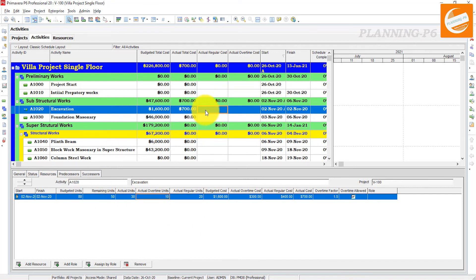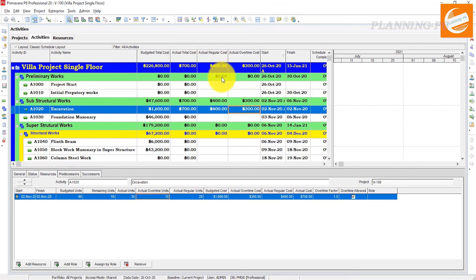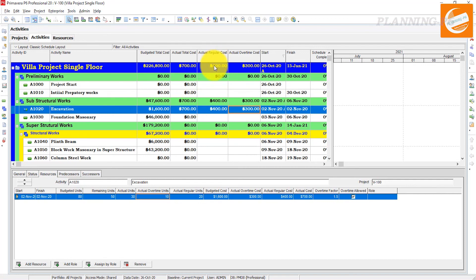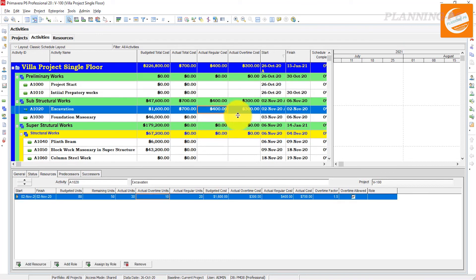Go to the activity and click on it — you can put the values in manually. The Actual Regular Cost shown in the resource details is 400, so put 400 in the Regular Cost column, and the Overtime Cost is 300 — put 300 there. Now you can see the total is calculated here, and also at the WBS level and project summary level, the total will be calculated automatically. Whenever you apply the overtime factor, you can check individual activities, put the overtime costs into those columns, and see the summarized total above.